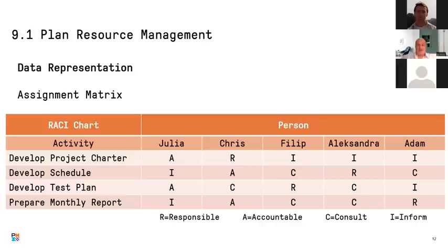If I'm preparing a report, and then my boss signs this report to issue it to an external party, then my boss is the one accountable. He takes the responsibility, and takes all measures to make sure that what's inside is correct and has been reviewed. The one responsible is the one really preparing the document, more than being accountable for it.